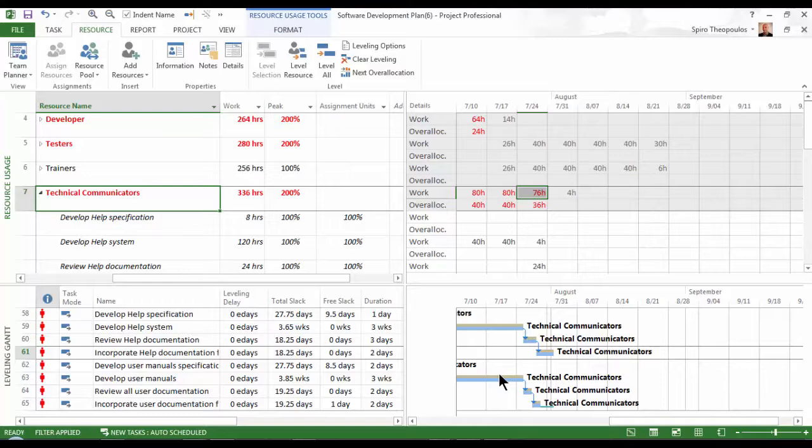Our bottlenecks are typically an individual or team of individuals, and they can vary from phase to phase in a project. The culprits or bottlenecks are often known or evident in an organization. So with the Level Resource functionality, you can isolate the resource or group of resources to focus the leveling feature on. Doing so will then reveal the next level or group of bottlenecks, if any. By addressing and reducing bottlenecks, organizations will be able to optimize their operations, therefore reducing their time to market, etc. Now, isn't that what we want and seek?